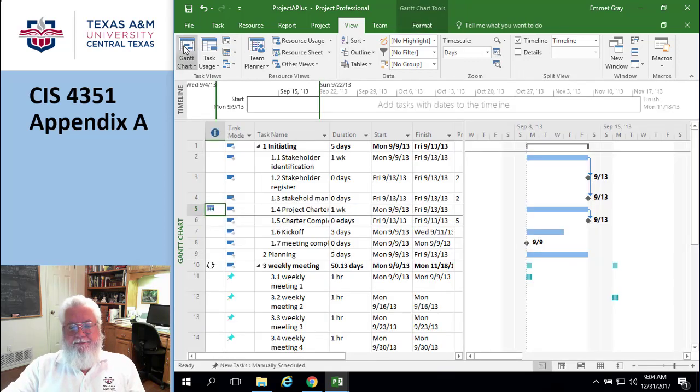Okay. Enough of that. Let's get back to this. So, cost and resource management on page 46. A lot of people are used to their own costing system. They don't want to use Microsoft Project for handling real, honest-to-God, billable cost. So these cost estimates are not really designed for sending a vendor a bill. These are for planning purposes. So keep that in mind. We typically don't use this for honest-to-God accounting purposes.